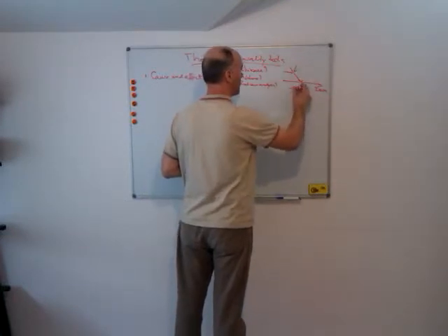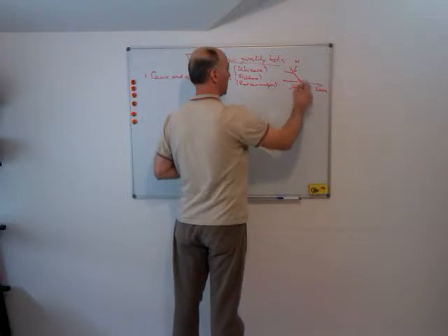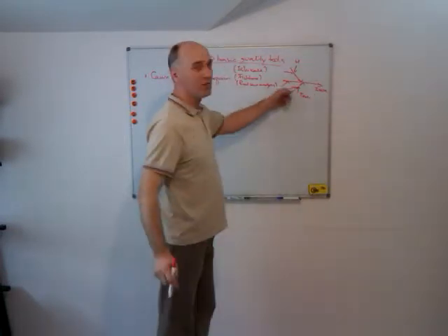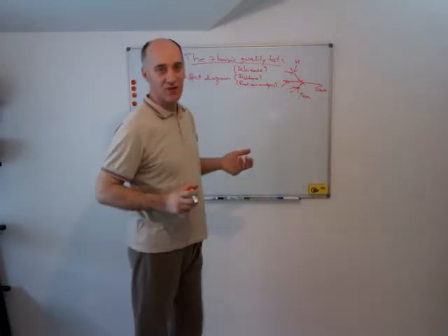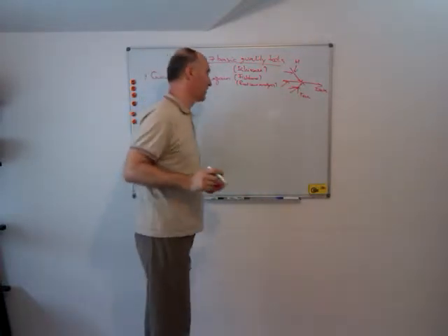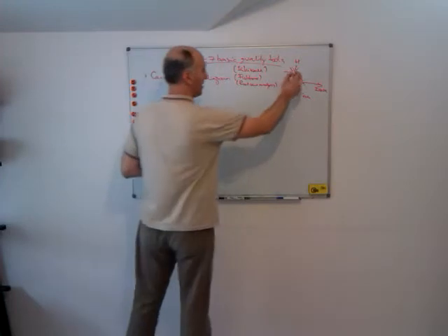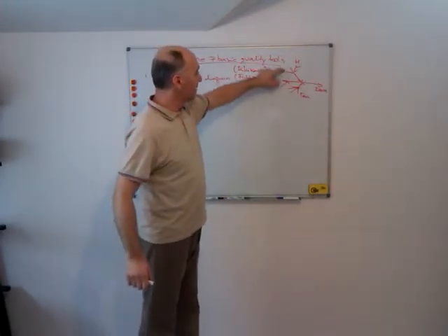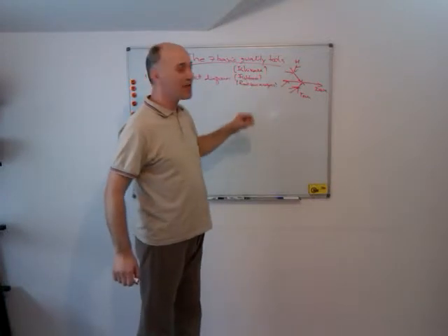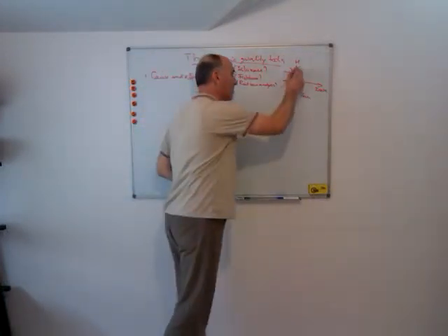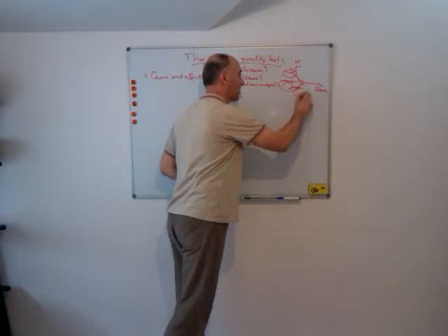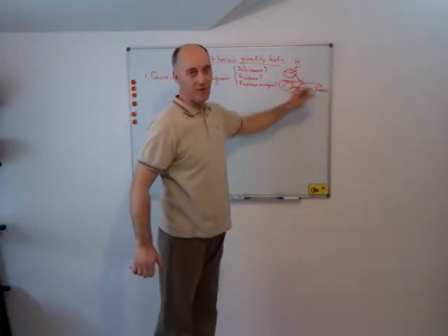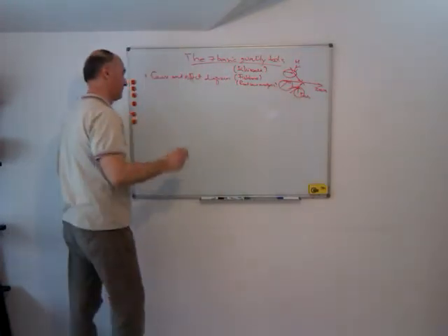So we have human reasons, we have technology, outside factors, some legislation, raw materials and so on. And as you can see, you can ask why this happens a few times until you act on some very deep, very important causes of this problem. So this is cause and effect.